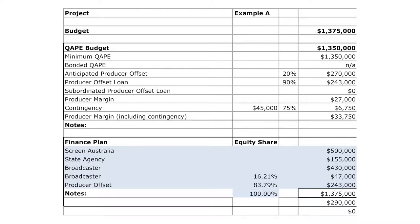In this finance plan, the keystone investor was the broadcaster — they were in first, in for a licence fee and also equity. Then Screen Australia came on board, the state agency, and then producer offset at 20%. The budget is $1.375 million, and your quake budget will always be lower because not everything in the budget is quakeable. Into the finance plan is 90% of the producer offset. Within that quake budget you don't have your contingency, so you've always got a buffer there.